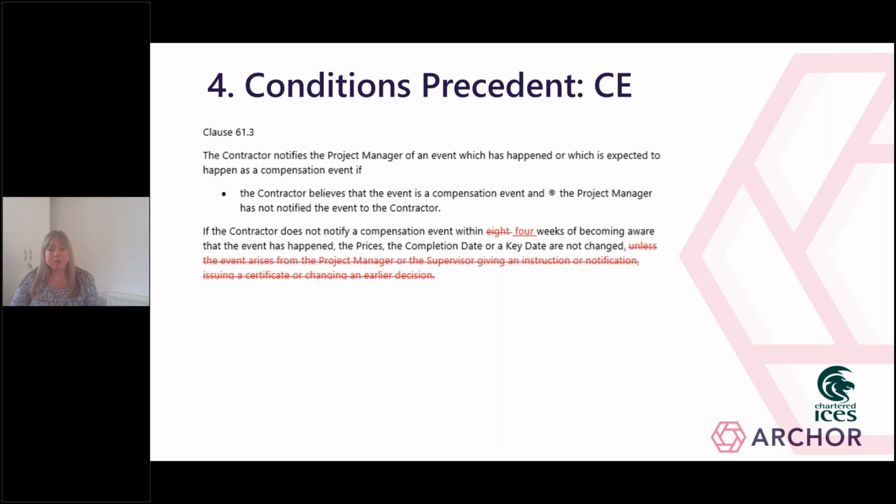So a condition precedent clause should cover the following matters. Firstly, it needs to have a deadline for fulfilment. There needs to be a set date and not put the parties under an indefinite obligation. Secondly, the clause needs to set out the consequences of non-fulfilment. The clause needs to state what happens if the condition is not satisfied. Thirdly, the clause needs to set out the steps to fulfill that condition. So a condition precedent clause should specify exactly what is required for the condition to be fulfilled.